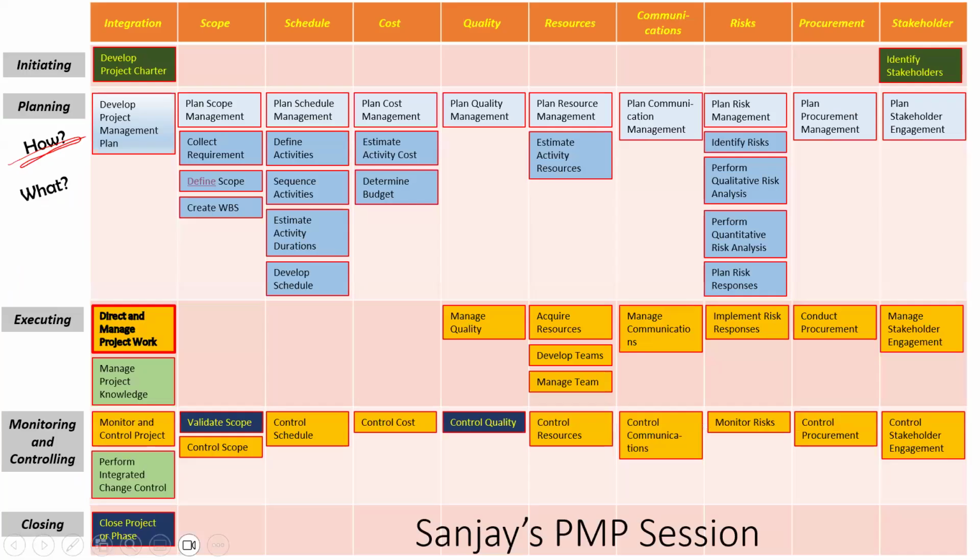Now, in the scope management plan, you will say how you are going to collect the requirements. Will you conduct interviews? Will you read some old documents, document the requirements yourself, and get them approved by the customer? What is going to be your approach? That's the strategy, the approach. How are you going to do everything related to the scope? How are you going to document? Are you going to use any tool for that? When it comes to requirements, how are you going to capture them? How are you going to prioritize them? Is that important, friends, to prioritize the requirements?